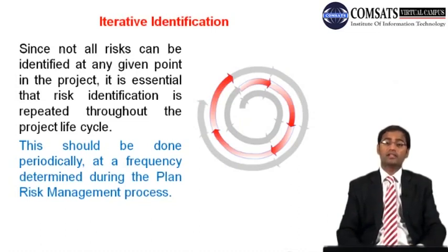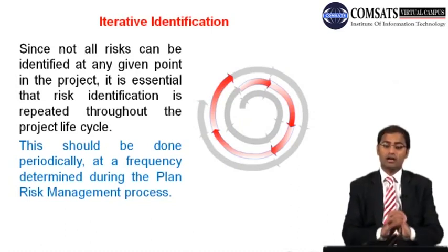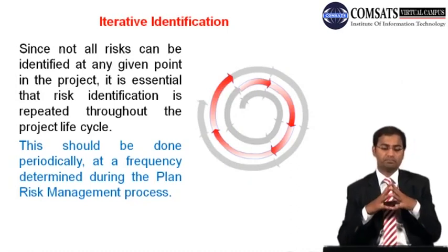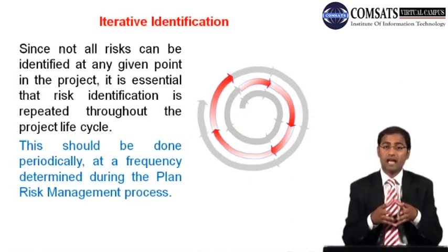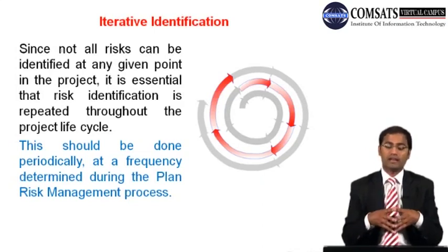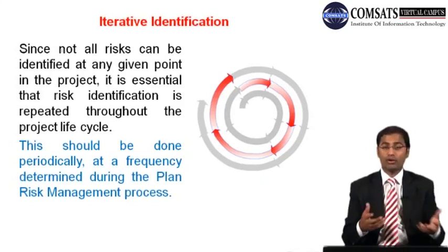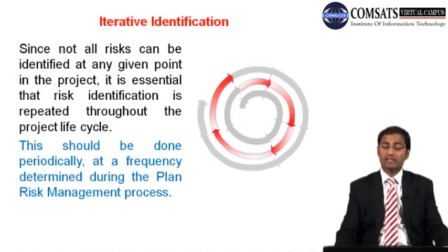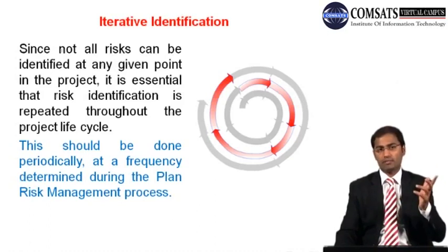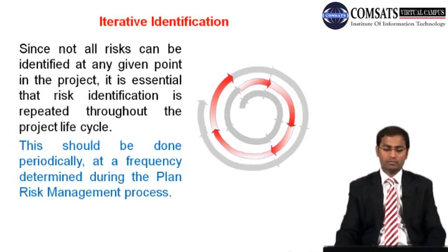And then there is another concept, that is iterative identification. Since not all the risks can be identified in the initial stage, it is essential that risk identification is repeated throughout the project life cycle. So this should be done periodically at a frequency determined during the plan risk management process. So remember the frequency part, how much we have to have this frequency.